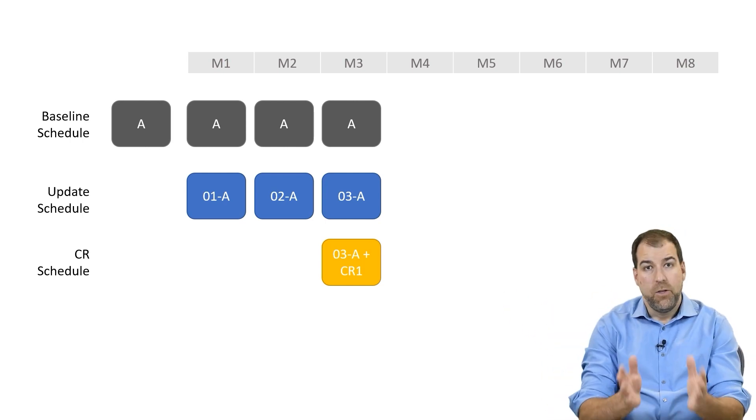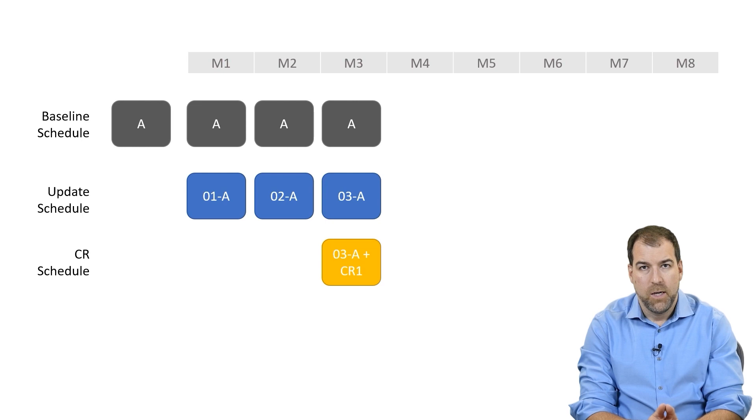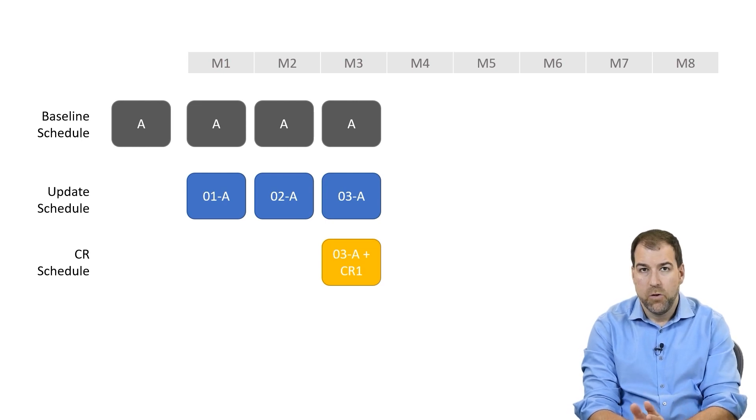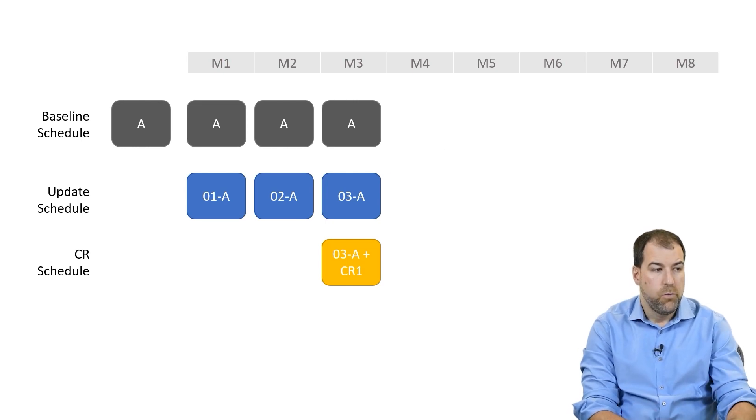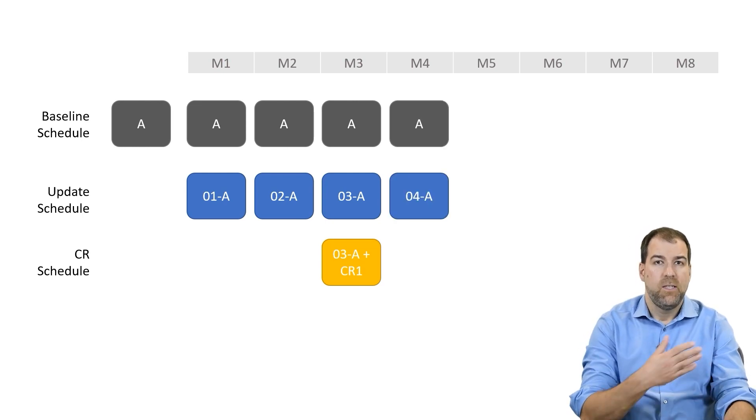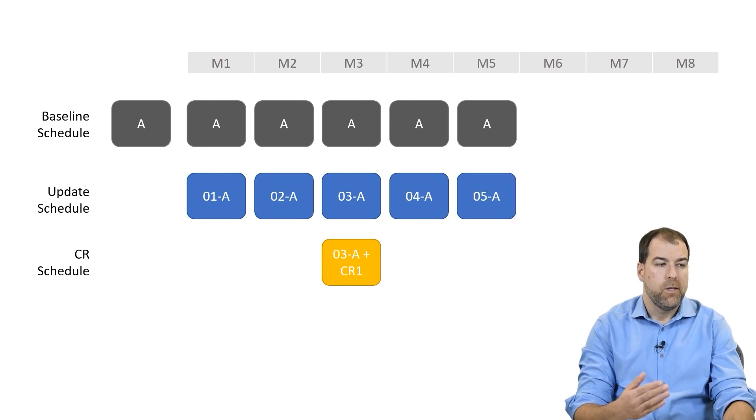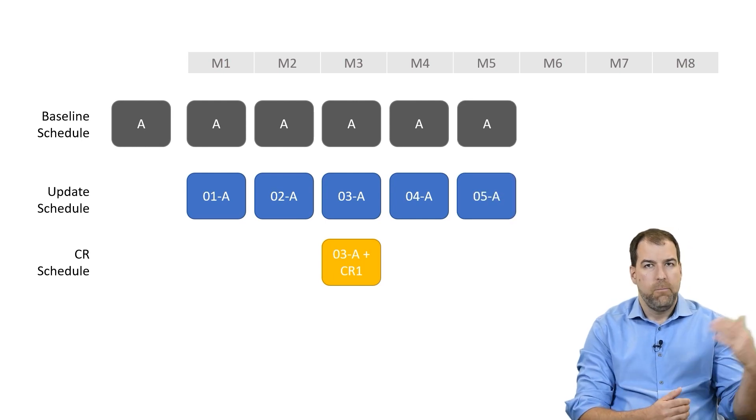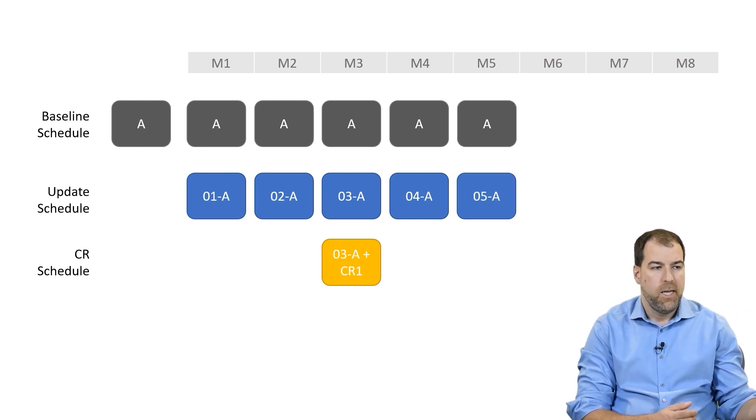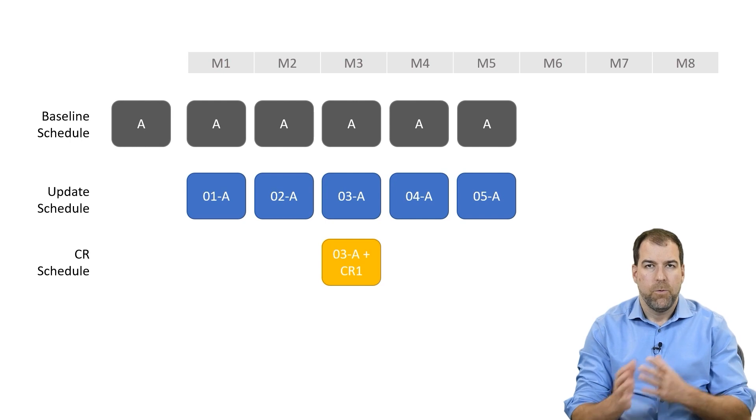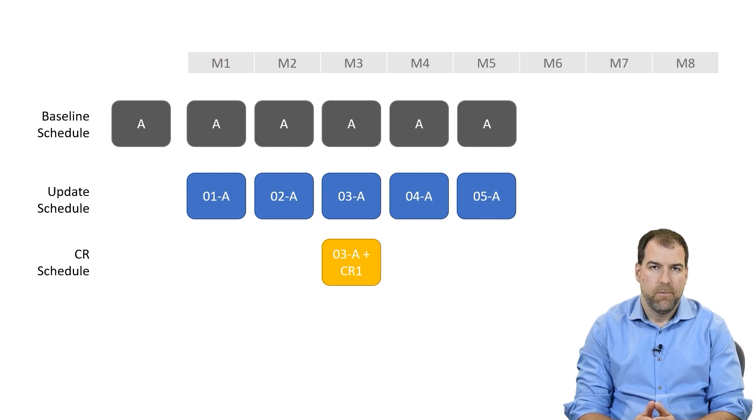Now, you know the owner is going to take some time to review that, and the show must go on. So we are going to continue to progress using the same baseline, baseline A, and progress for month four, progress for month five.